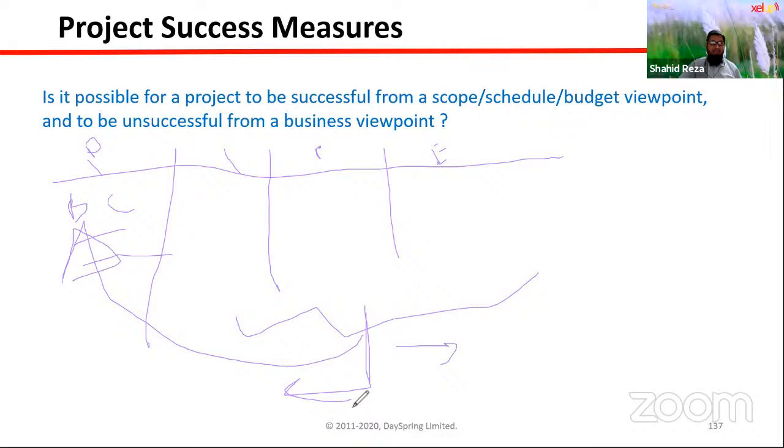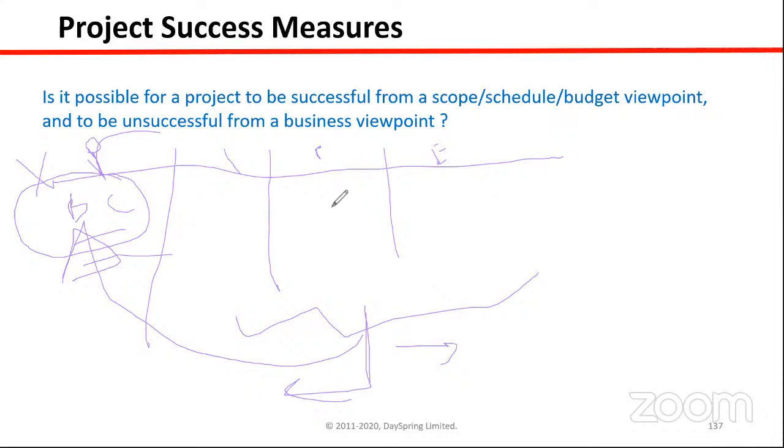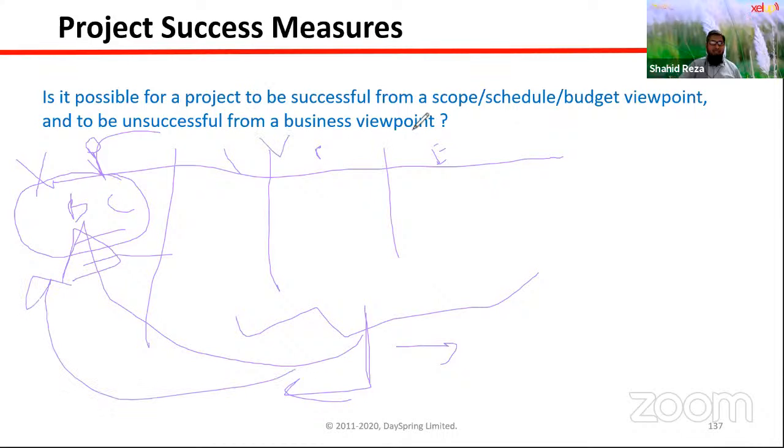This is very important. So the business case is not a static document. In PMBOK it actually doesn't mention updating the business case, but in a real scenario, if you see the targeted business value is not possible to gain, then better you update the business case after every phase or every important milestone.